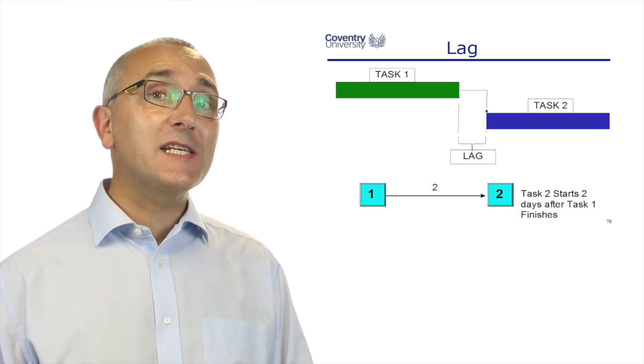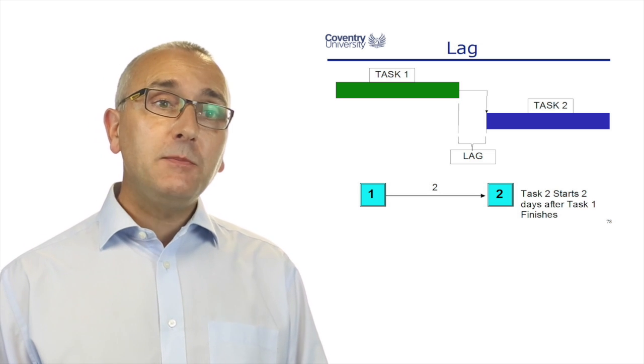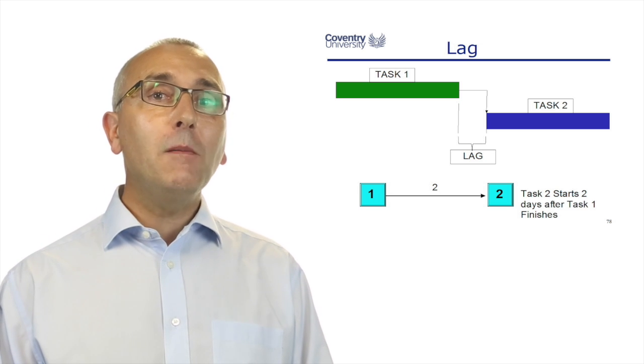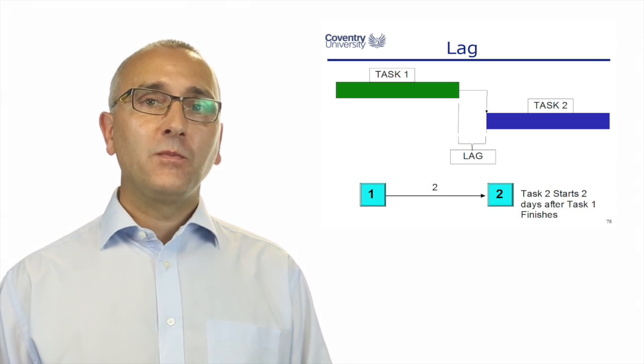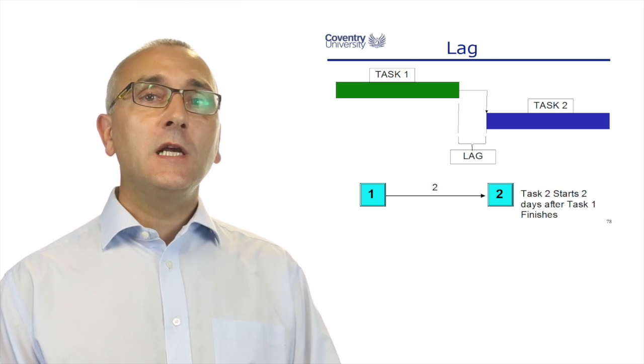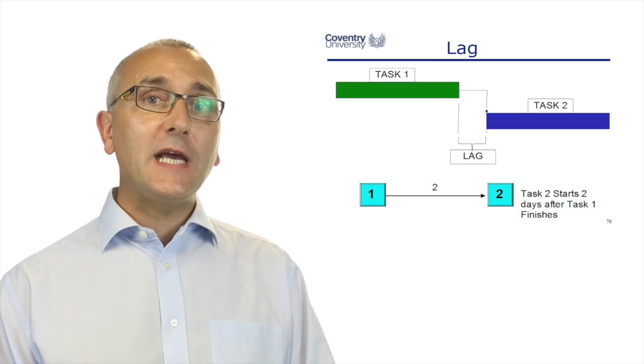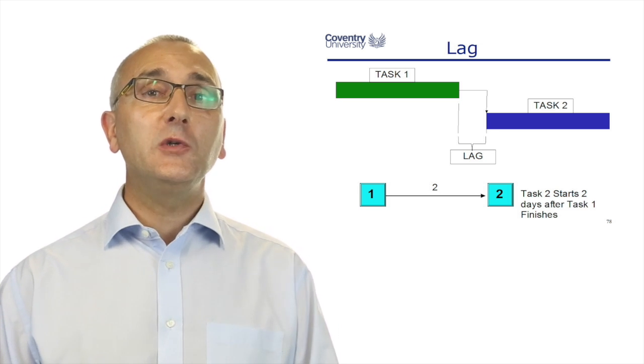In the Gantt chart, we just show this as a gap. In the dependency chart, we put a number onto the arrow. So when task one finishes, this is indicating we have to wait two days before task two can start.